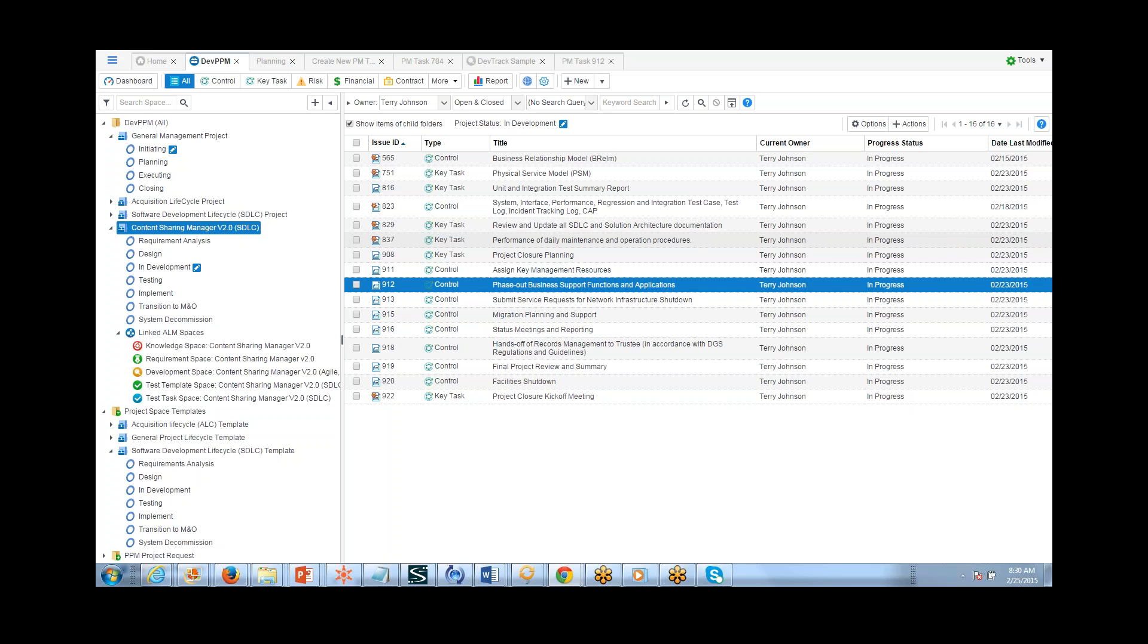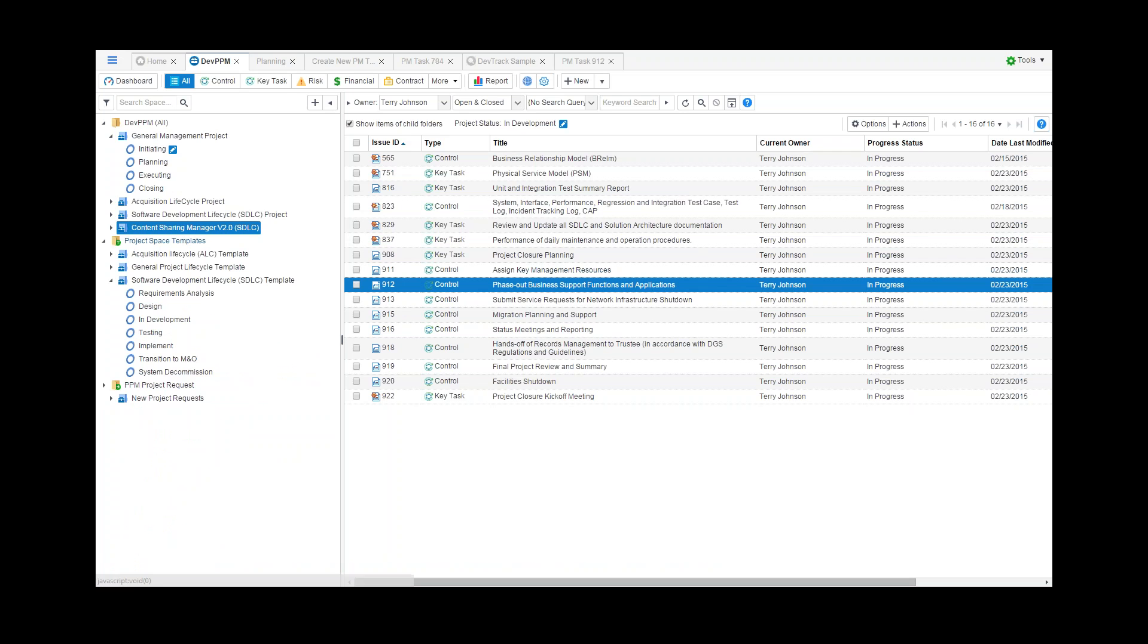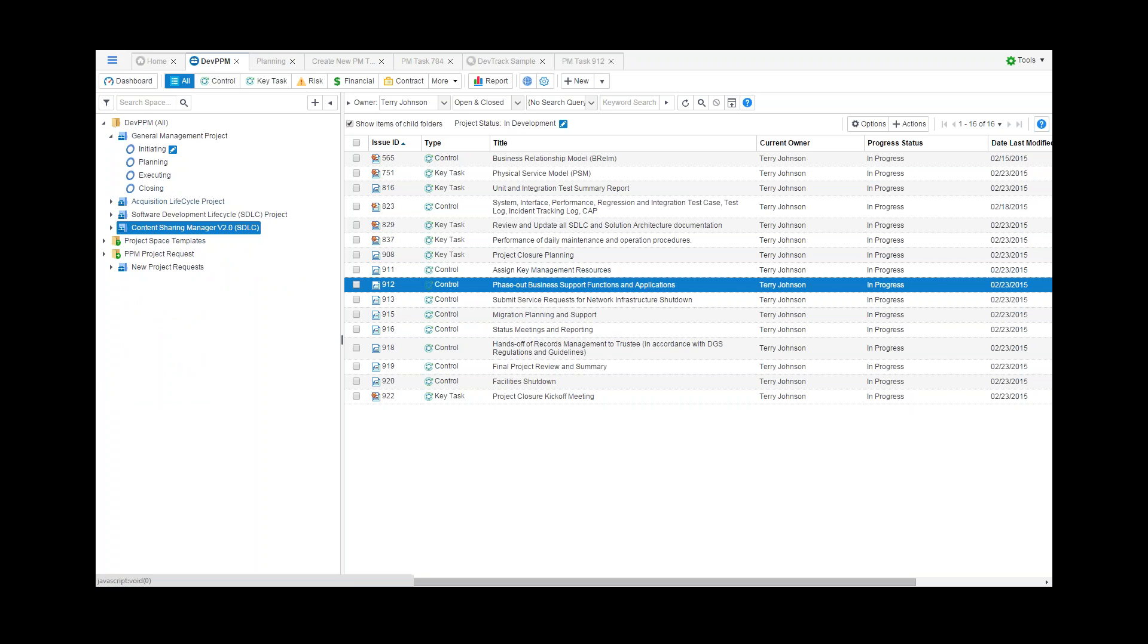A set of project types can be predefined in DevSuite Project 1 with project templates. A project template lets you define the milestones, the key tasks, and the workflow resources so that when you create new projects, it is easy and created with all the management tasks initially populated.